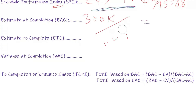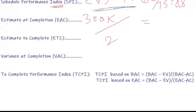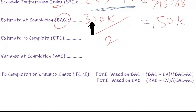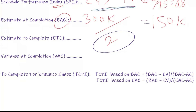For example, if your CPI were 2, the EAC would be $300,000 divided by 2, giving $150,000. That would make sense if for four miles you spent only $30,000 instead of $60,000 — you'd be spending half the money and getting the job done, so a $300,000 job would finish at $150,000. That's why CPI goes in the denominator.